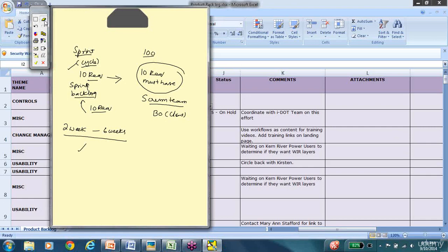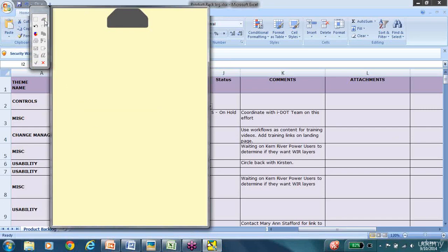So far we know that there are user stories, there's a product backlog, and in that the prioritization happens, and then you pick out a few of the must-have ones, or prioritized user stories, and make that as a sprint. Sprint can range between 2 to 6 weeks time. And you see, 2 to 6 weeks, in comparison to 6 months, do you think that is a huge difference? Don't you agree? So that is why Agile is a very rapid or fast process.